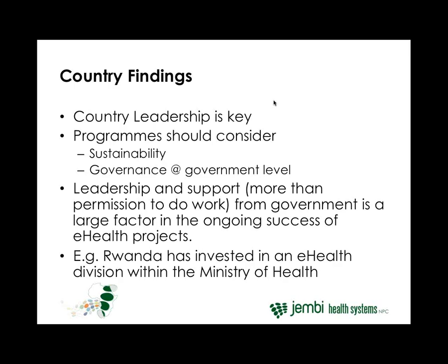What RHEA, the Rwanda Health Information Exchange, has done has been to look at this from the get-go, from the beginning of the project, to focus on the sustainability and the governance of it by including the Ministry of Health and having them be the primary sponsors and client, and investing in their teams to be actively participative in the project. That is not just sitting on a conference call, but actively involved in the creation, deployment, and management of the tool moving forward.